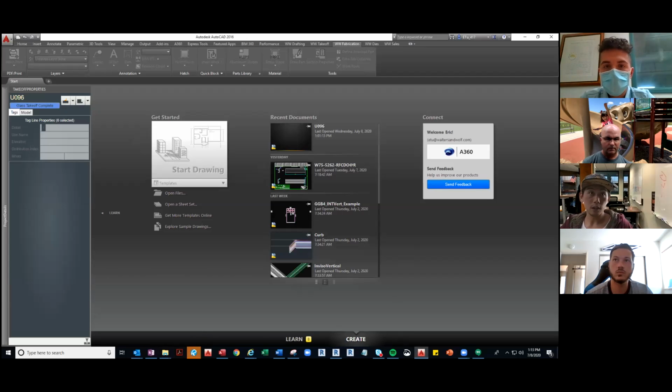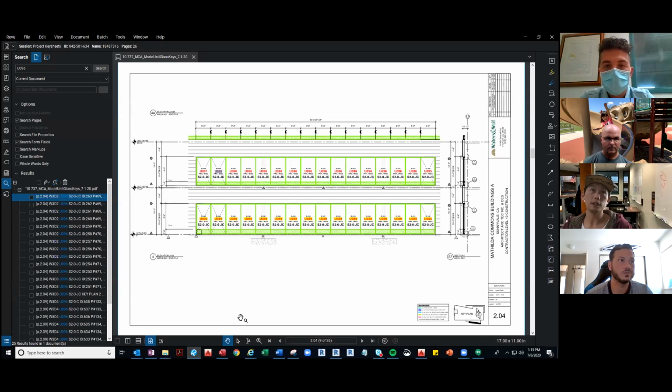Once that's set, normally we would go, say, after metal takeoffs are done, or even during metal takeoffs, right? So the step is, once we palletize, meaning we separate the units by week and break it down by how the shop and the field want it, we move on to what we have now, a setup stage. We set up all the data for metal takeoff, for material takeoff. And material takeoff, you only get one week to do it. So we have to make it as quick as possible, right?